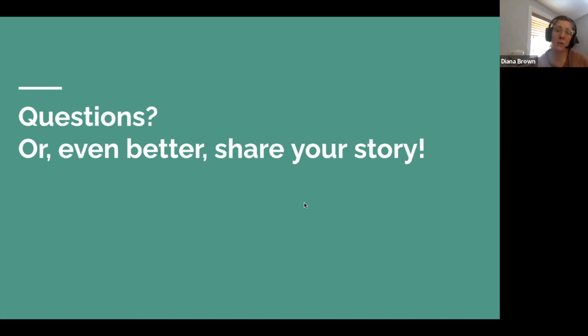I'm all about meeting them where they're at. It doesn't have to be dogmatic. So yes, we did discuss it, because I've done it in other places, and it's like, look, we just assign 0. And this might be a dirty little secret, but I actually don't size UX work ever in a backlog, because I never measure velocity, in part because velocity is a controversial thing. There are a lot of teams in engineering who've moved away from velocity for legitimate and valid reasons. Velocity only makes sense when you're looking at it in aggregate across a team. Typically, you only have one designer or a part of a designer assigned to a team, so looking at the velocity of one person is not a useful metric typically. And so I don't waste time with it, because I'm also not measuring the velocity of my team.